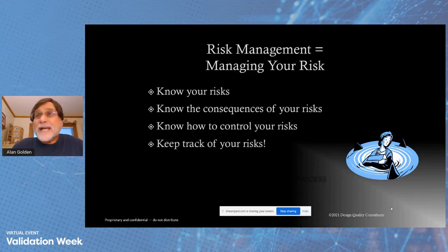You need to keep track of them. I mean, a lot of people think that your risk management documentation is something you kind of get together during development and then you're done. That's not true. Risk management is a living document. It lives for the life of the product all the way through removal of that product from market, if that ever happens.